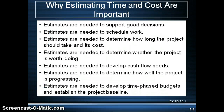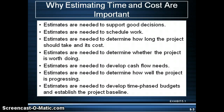On this slide, we list some of the different reasons why it's important to estimate times and costs. Early estimates will generally be a macro estimate to determine if the project is worth doing or if the organization has sufficient funds. Later estimates will be a micro-type estimate to give project timelines and costs so that they can understand cash flow needs, schedule resources, and provide a baseline for measuring project progress.